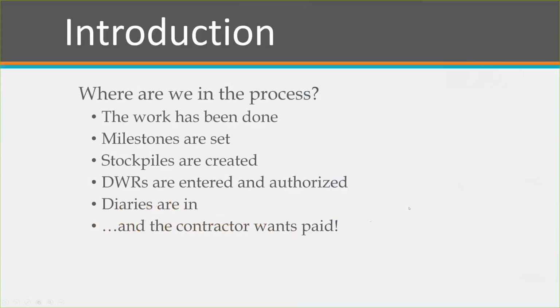So just to define a little bit where we're going to be at in the process, basically the work has been done by the contractor. The contract has been set up in SiteManager. Milestones are in place, any stockpiles have already been created. DWRs have been entered by the inspectors and authorized, and the diaries have been created with all of their comments. And now, at this point, the contractor wants to get paid.